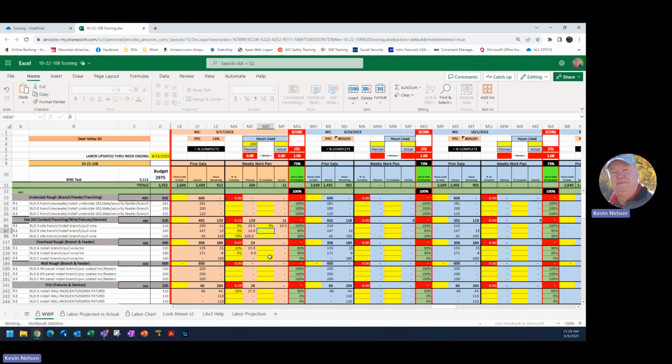Building B, we did the same thing. We said, but we got that done. So we're good there. So now you can see my score, my percentage complete, excuse me, is 100%. No single task can be more than 100%. So I couldn't assess this task, if you'll see this 30% number, and say, well, I got 75% of that done. You see, it put me at 105% complete. That's impossible. The most you can be is 100%. So that's a correction that needs to be made.